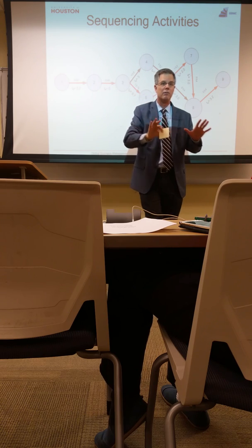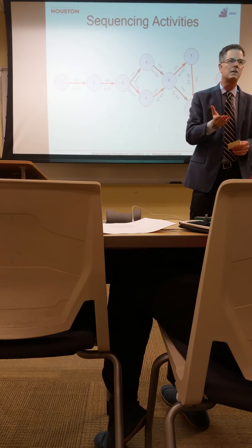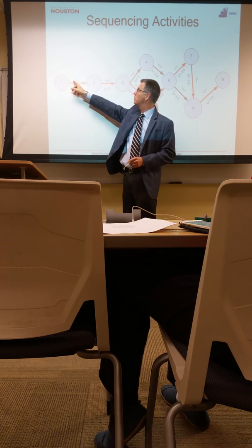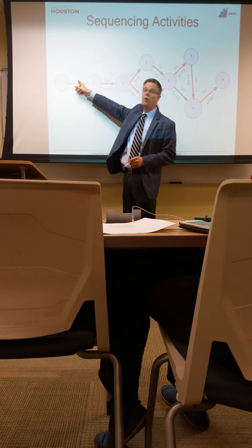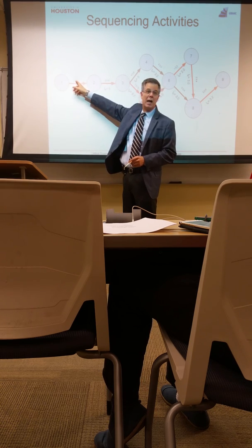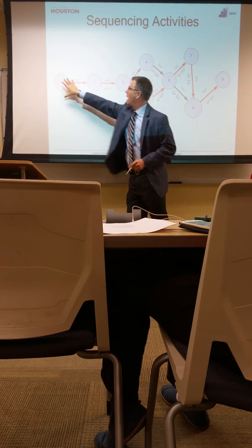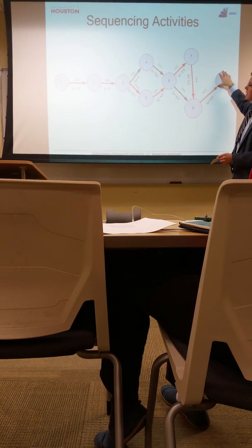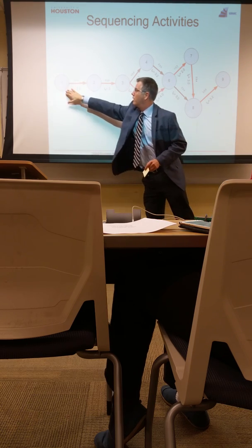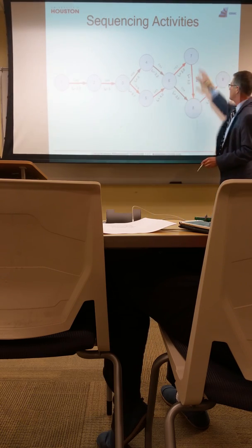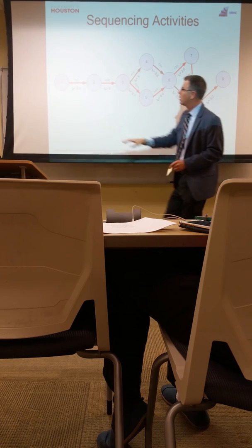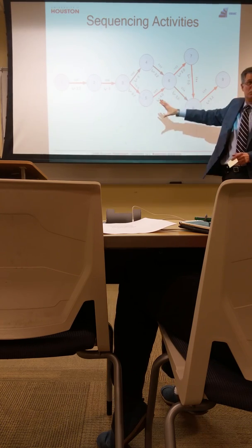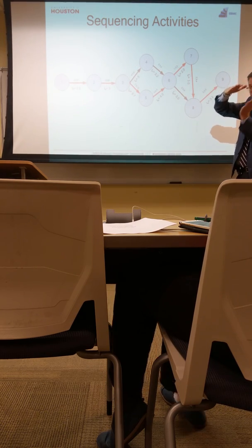Again, this is getting a little bit down deep into the scheduling, and those of you who are taking the project management class will learn this, but you put the optimistic, remember we saw optimistic was 1 day, pessimistic was 4 days, and the most likely was 2 days. You put that in here, and then you can see that these are 2 different paths to get to the end. It could follow this, or it could go this, right? You can sequence these things in parallel.